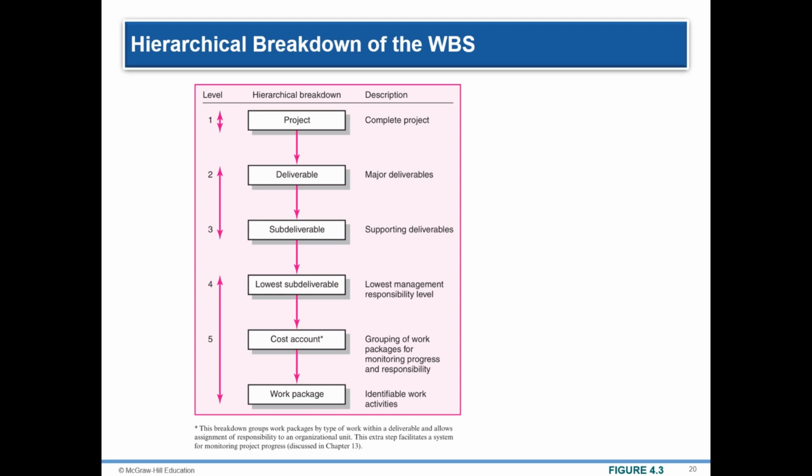This figure shows the major groupings commonly used in the field to develop a hierarchical WBS. The WBS begins with the project as the final deliverable. Major project work deliverables or systems are identified first, then sub-deliverables necessary to accomplish the major deliverables are defined. The process is repeated until the sub-deliverable detail is small enough to be manageable and one person can be responsible.